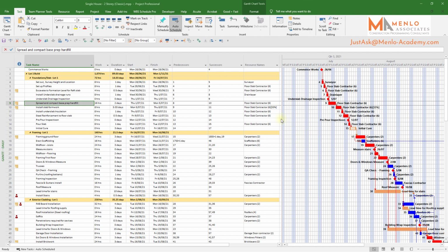Now, as I always say, you program first on the logic, so that it's the logical relationships of when things can happen, and you do that on the assumption that you've got unlimited resources, which means if a job can start, it has no relationship to whether you've got the resources to do it or not. That's the earliest logical point it can start.